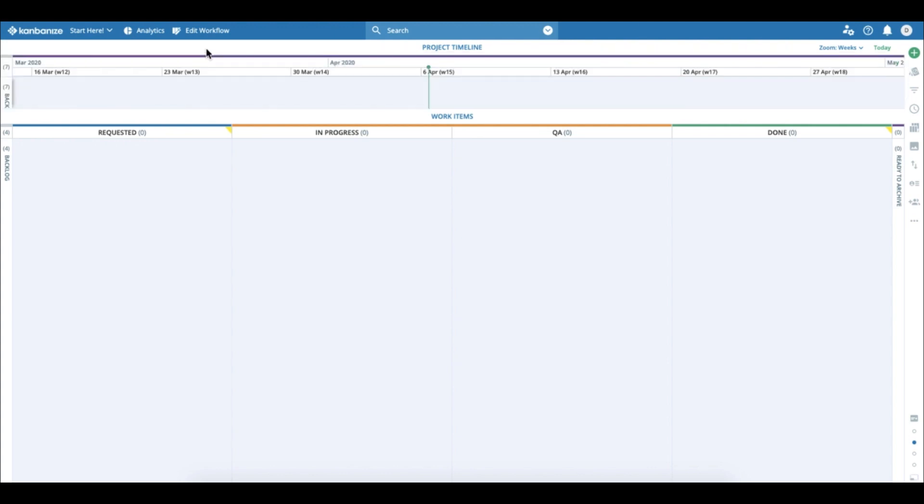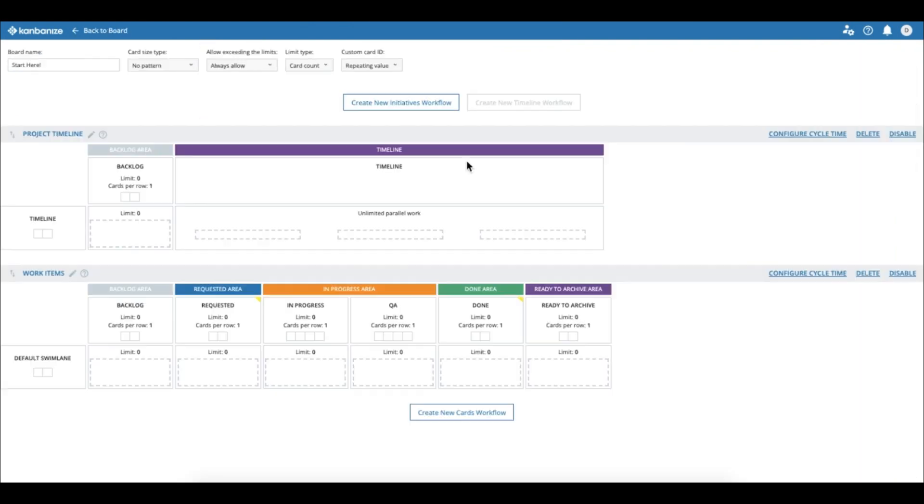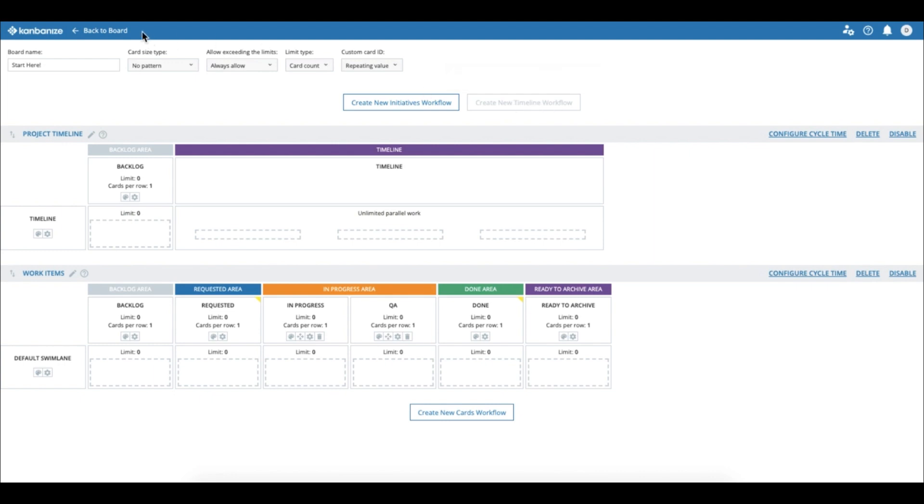First of all we have to add it to your board. Go to Edit Workflow and then press this Create New Timeline Workflow button. Save the changes and go back to your board to see the timeline showing up.